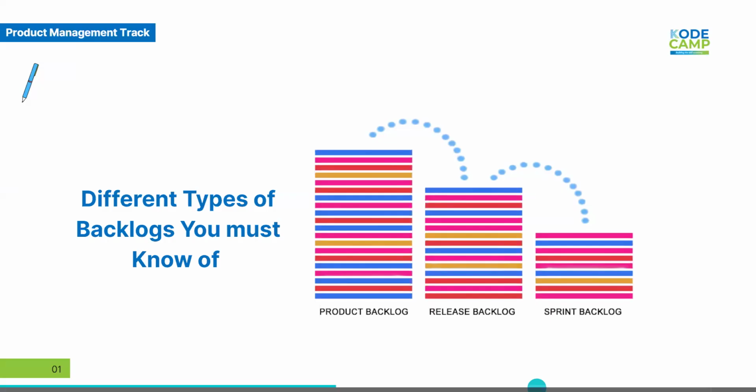So when someone says we should let users create invoices, you go back to your roadmap and you ask yourself, does that fit into this phase? Maybe you're in phase 1 or phase 4, or maybe that's just a phase 5 thing. And you get to tell that person, no, we are not there yet. And you plan according to the phases and stages that you have on your backlog. Now, this roadmap becomes your anchor. It connects your backlog to something strategic. And most importantly, it helps your team know why they are building what they are building.